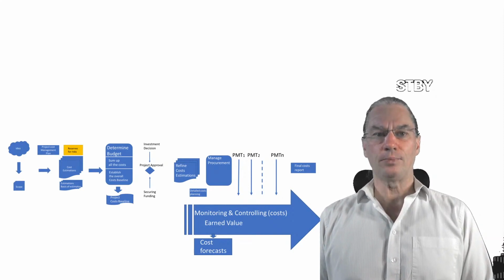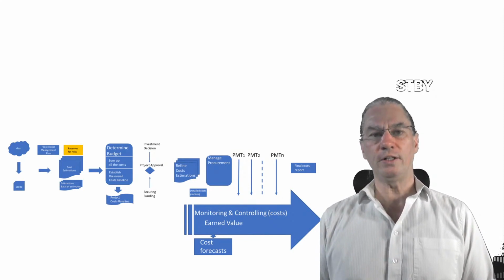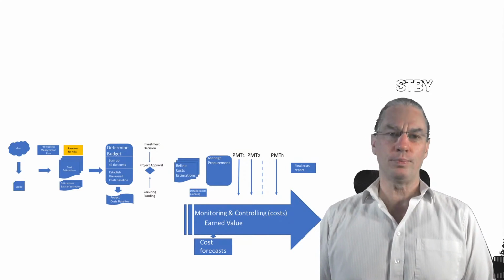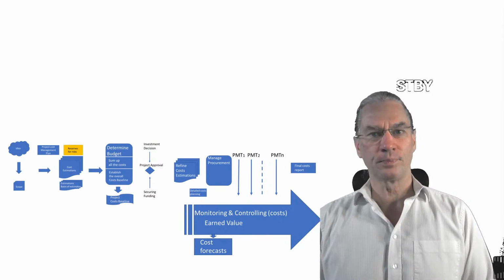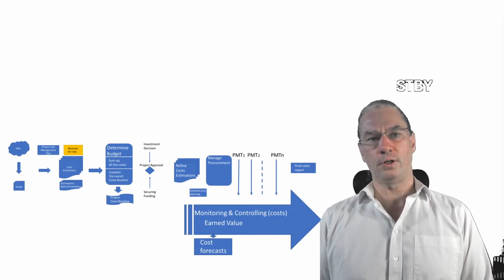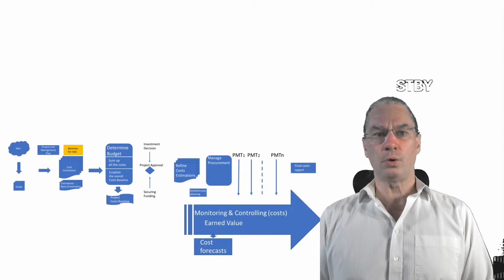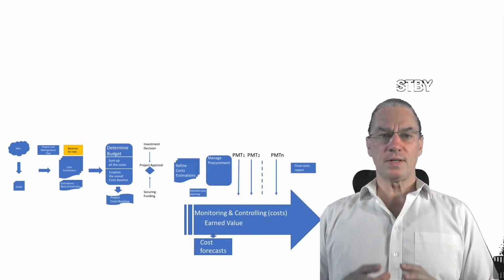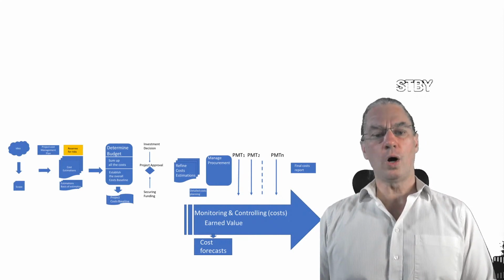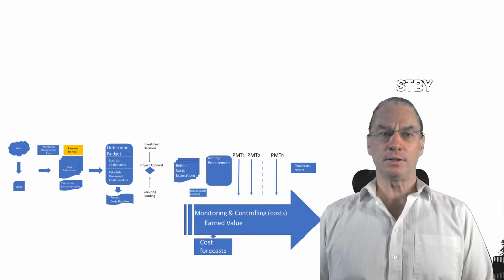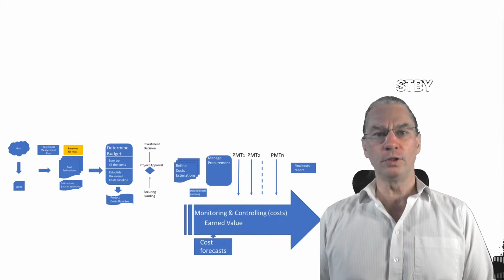So now you have the costs, you are ready to go for the budget, and you can start to prepare it. A budget will also contain another kind of reserve, which is called management reserve. Once all this is set, you are ready to go for the approval, and you will get the approval.